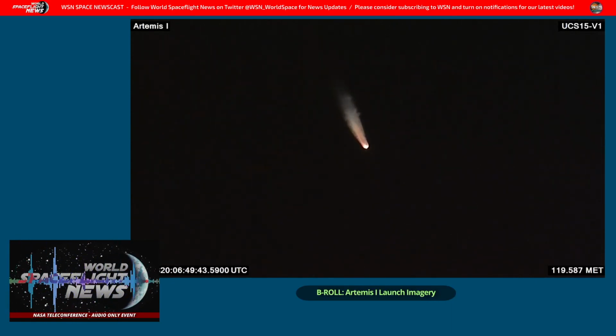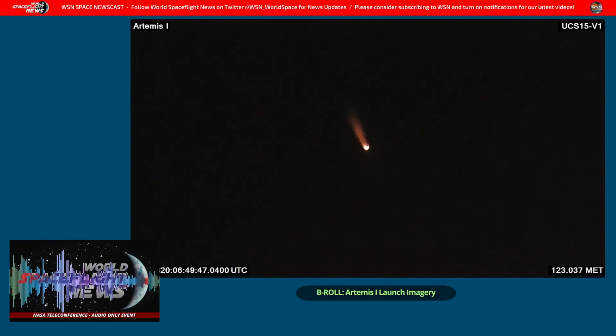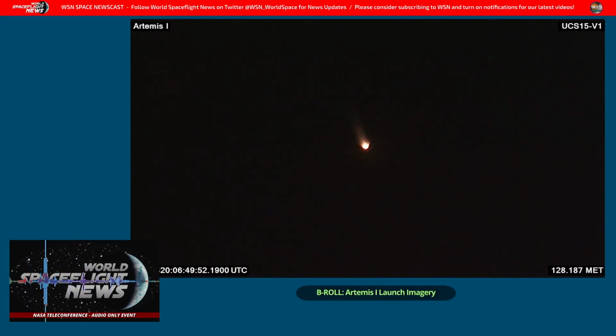In the Launch Control Center, we are updating our launch countdown timelines to include crew donning of the spacesuits, making the trip to the launch pad, getting into the spacecraft, and atop the launch vehicle. We're making updates to our ground software for Artemis II that will include additional automation, and these are largely based on lessons learned from Artemis I, as well as adding additional capabilities to support Orion's life support systems.